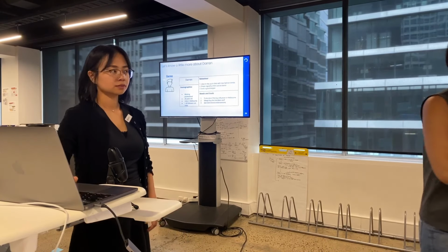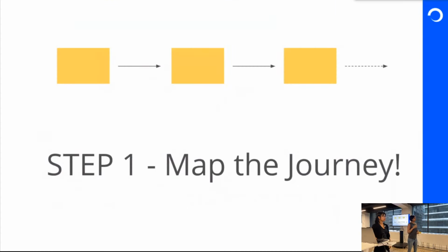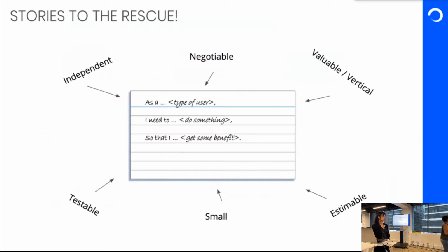All right, so we'll skip this one. So that's the first step that we did. We mapped the journey. Now the second step, and that's where stories come into the picture. Now what we're going to do is take the basic backbone that you have created. Let me look at one of the basic backbones. Maybe select a shoe, right? You've seen a catalog of shoes online. You can break that catalog into multiple things.